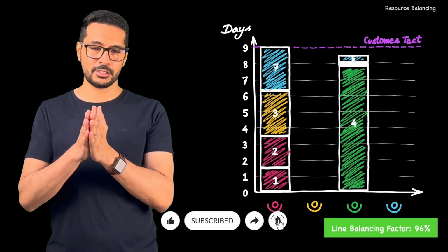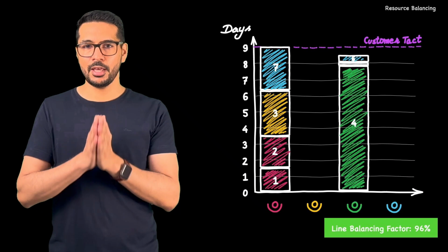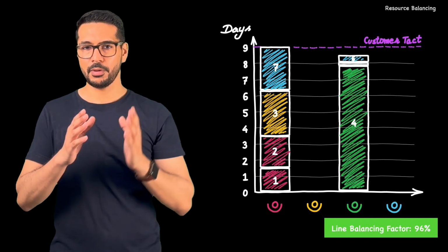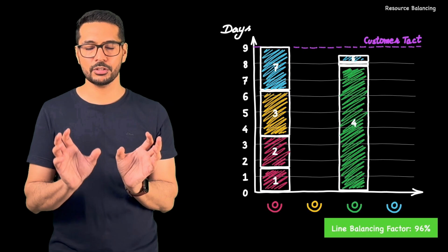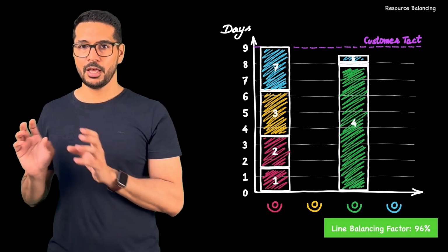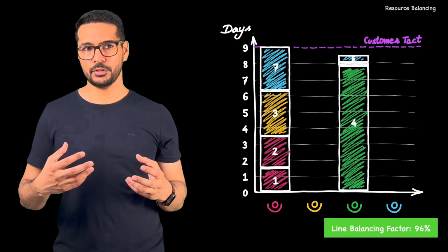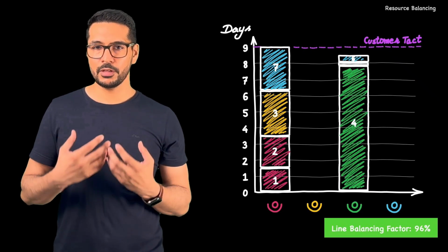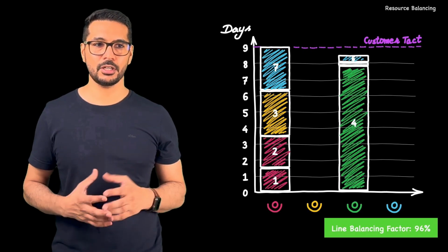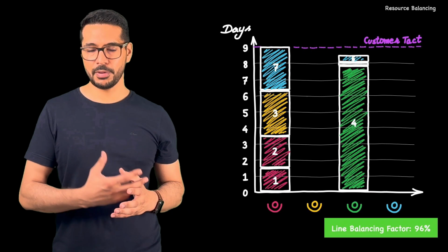The tasks could be performed by employees number 1 and 3, and we are still below the customer demand. By doing this, these 2 employees could be used in another department or for other tasks, and this will help the company deliver the project with 50% fewer resources. So we have certainly increased productivity where there was waste in the past.